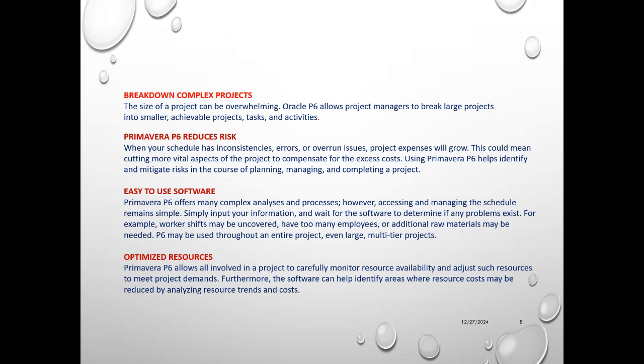You tell the software, okay, as per the project schedule with the start and end date, this is the resource allocation. Now, give me a solution. If I can only deploy 150 per day instead of 200 per day, what is the solution? Primavera will give that. It will help you optimize the resource through either a resource leveling method or a resource smoothing method. We are also going to learn this as part of the course, as part of the training.